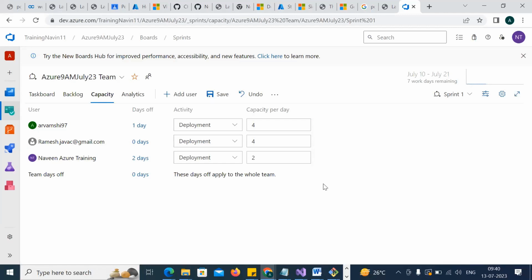Now, total at the time of taking the story from the backlog, we have 200 plus requirements. Based on this only, I can give it. So how many hours will Vamsi be there? 4 hours. So how many days? 9 days. So 9 into 4, 36 hours. Clear? Vamsi will be available for 36 hours, right?